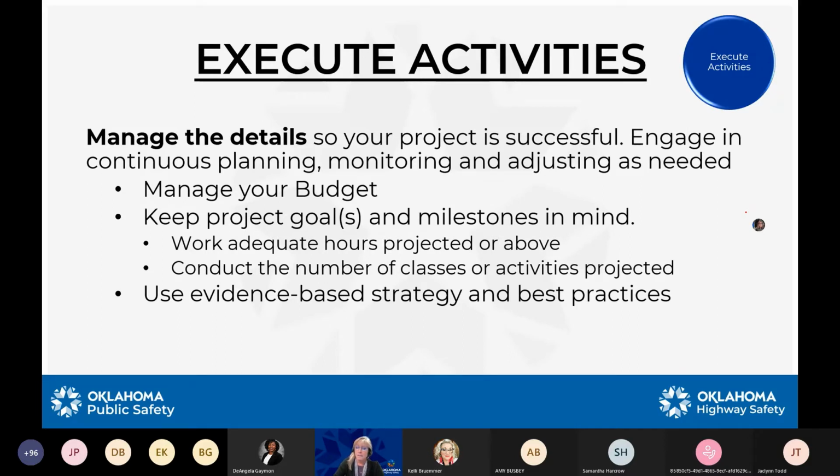Approved equipment and other items in the grant are intended for use within the grant year, so be sure to coordinate with your agency personnel to purchase equipment early in the year so it can be deployed to enhance your project. Your milestones and targets are periodically reviewed. This is how we track the progress of your project, so you should also be reviewing these.